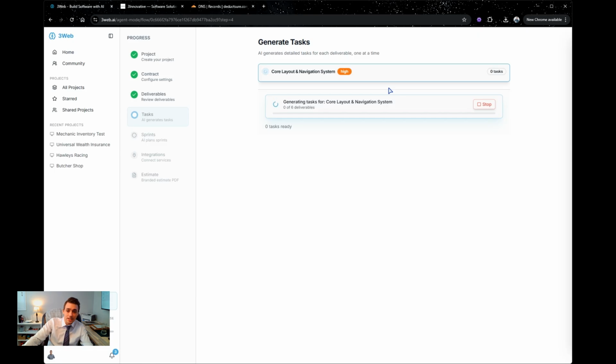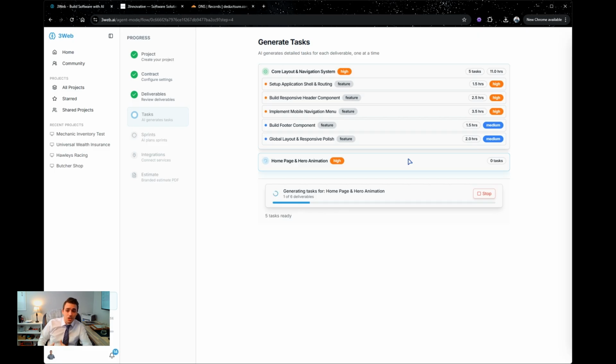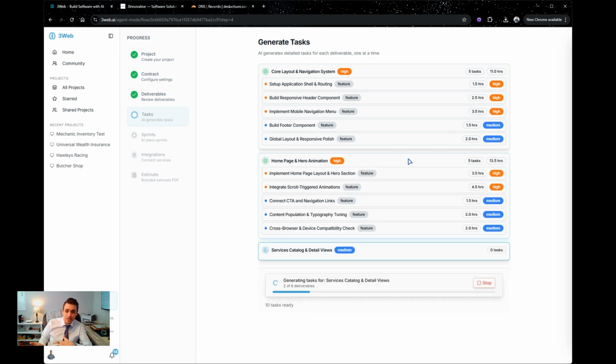It's going to estimate the task based on the contract that you've put in. So for my other agency, what we do is we work on a lot of story points. So we'll charge a fixed monthly rate and you get so many points per the capacity tier that you're charged with. In a lot of cases, it's going to be an hourly based. So these are a nice blend of hourly estimates as well. So it's factoring in, hey, you're going to use AI to build this, but at the same time, it's going to blend that with a traditional human estimate as well. So it's kind of finding that sweet spot in between. So it'll come out fairly inexpensive, but still profitable. And this will keep everybody competitive.